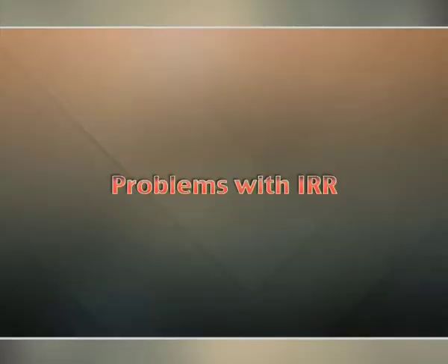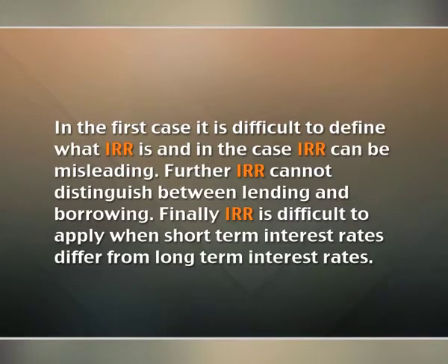Problems with IRR. There are problems in using IRR when the cash flows of the project are not conventional or when two or more projects are being compared to determine which one is best. In the first case, it is difficult to define what IRR is, and in the second case, IRR can be misleading. Further, IRR cannot distinguish between lending and borrowing. Finally, IRR is difficult to apply when short-term interest rates differ from long-term interest rates.